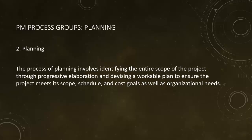And here in the planning phase, as you dig further into the details, you may find that what you have as a budget and what you have as a time frame and what you have as a wish list are not compatible. I can't get everything done by the date that this project has to be completed. Or I can't do everything that we want to get done for this amount of money that we've budgeted. And so what you will find is there is this constant balancing and rebalancing between scope, schedule, and cost. And it is in the initiating and planning phases that we set that balance, that we determine for this amount of things that we need to get done, we will have this amount of time and this amount of budget.